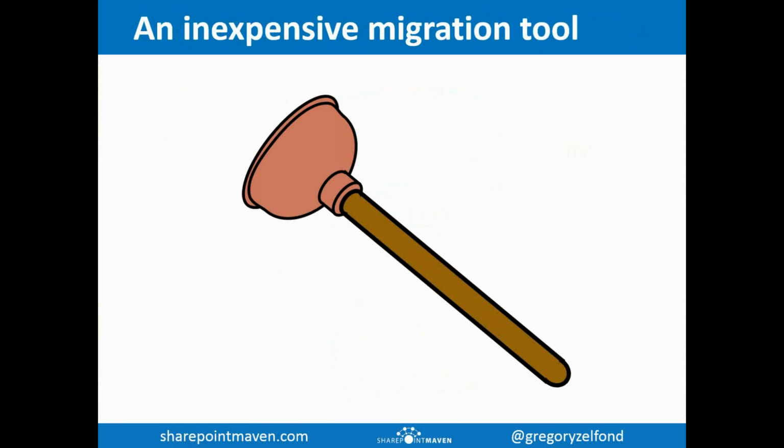Here is a slide that I usually show to my clients, and I'm really serious about it because, in reality, this is the most inexpensive migration tool you're going to have. And once again, the message here is you really need to do your homework. You really need to clean up the stuff first. Do not just drag and drop every single file or folder you have in your file share. It's not a storage limitation. Everyone has 1 terabyte of storage in their site collections these days. The problem is you are just recreating the mess for users that you had in the first place.